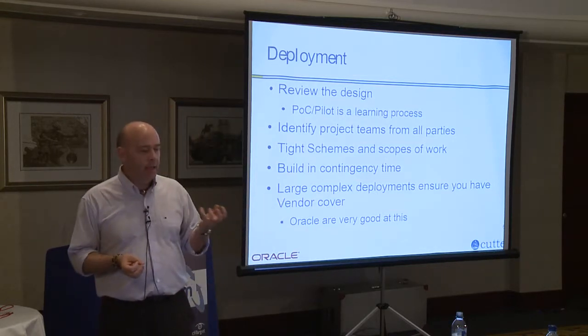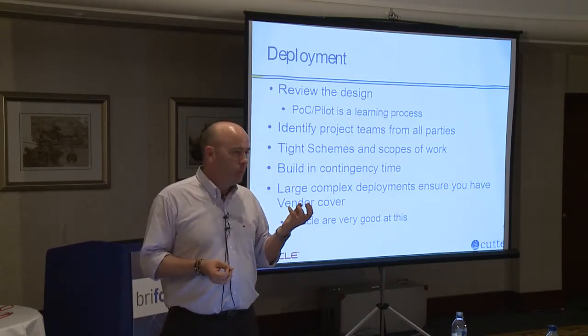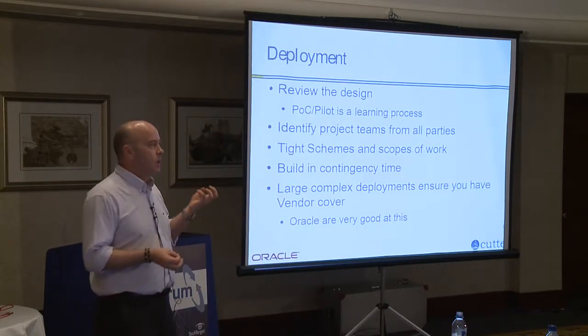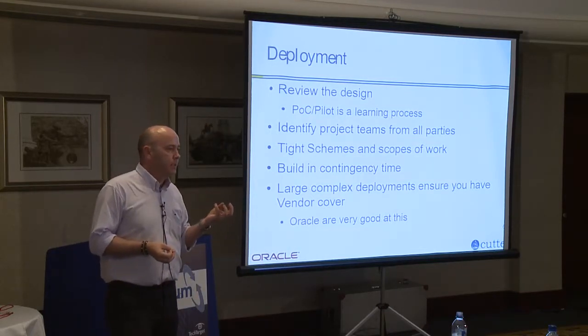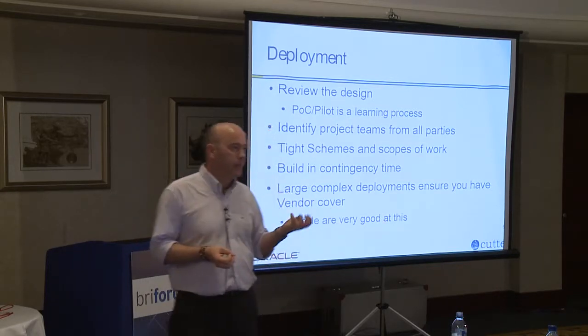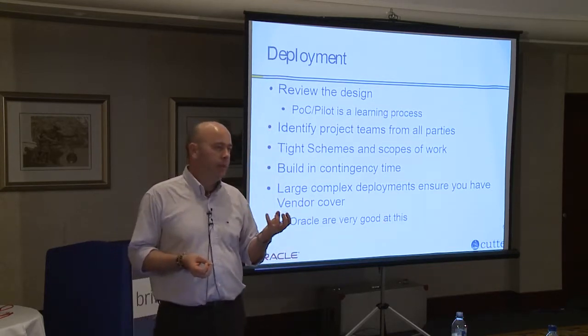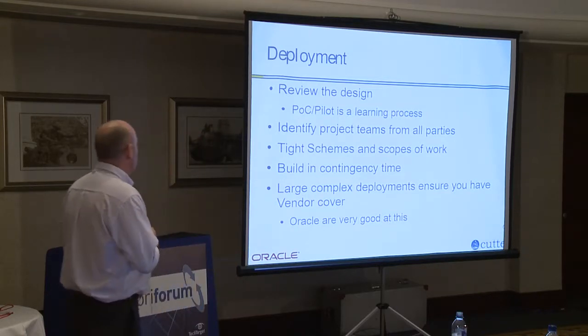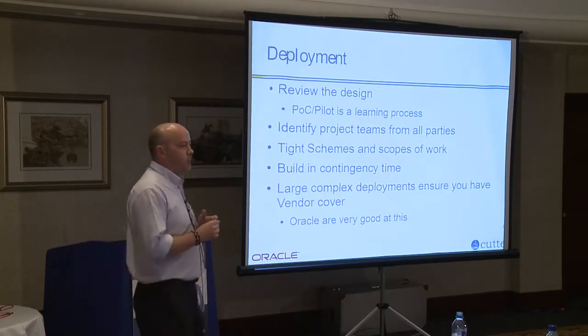Some of the software that's key and critical to the organisation's working practices may or may not fit particularly well inside a VDI environment. Therefore, engagement with those ISVs needs to be done early to make sure that you've got the support, should it be needed, through the deployment.